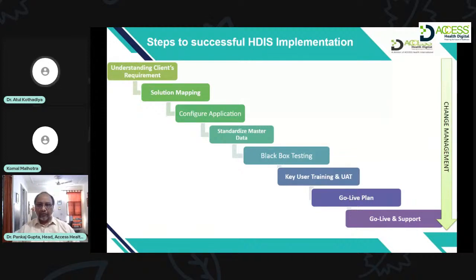So that's why the first important stage in any implementation is to gather the requirements. Because we had the written SRS document, we just took it blindly that these were the requirements. We never went to the end users to understand their processes, to see how they were operating in their department. If that had been done, we would have been in a better shape while implementing it. Of course, we did a lot of requirement work later on. The go live date was moved 3 months ahead. We did everything to meet all the requirements, and finally we did implement it.